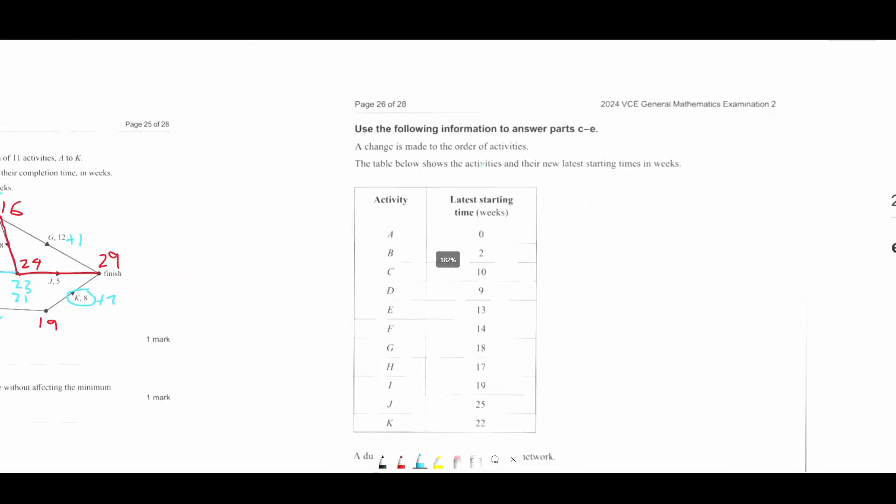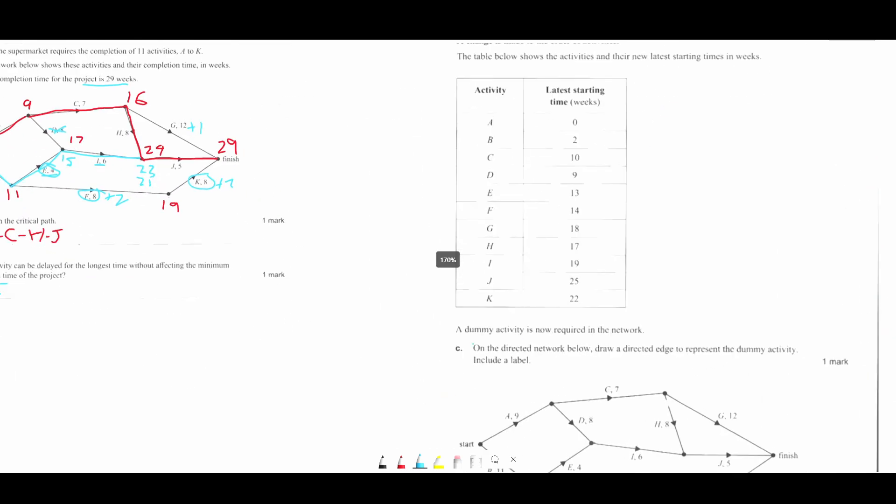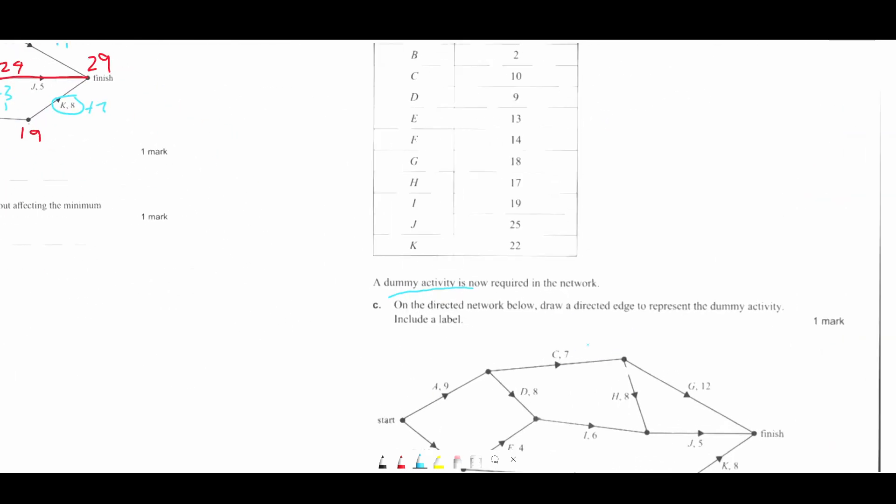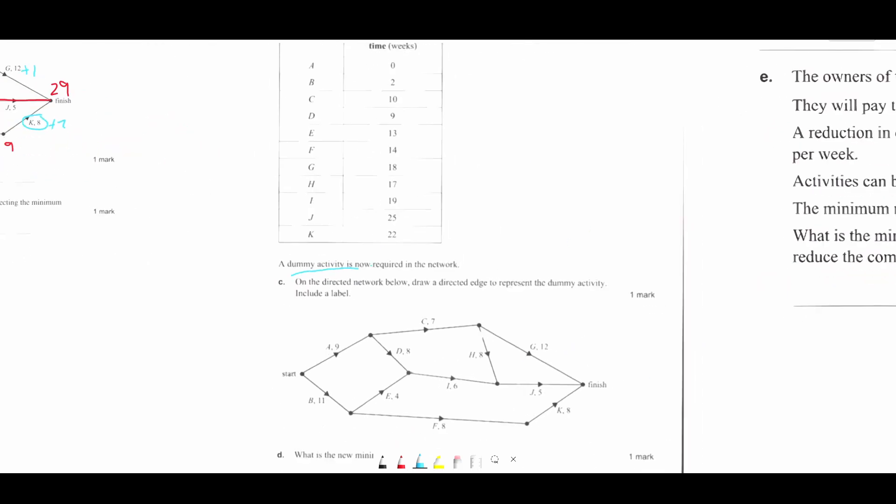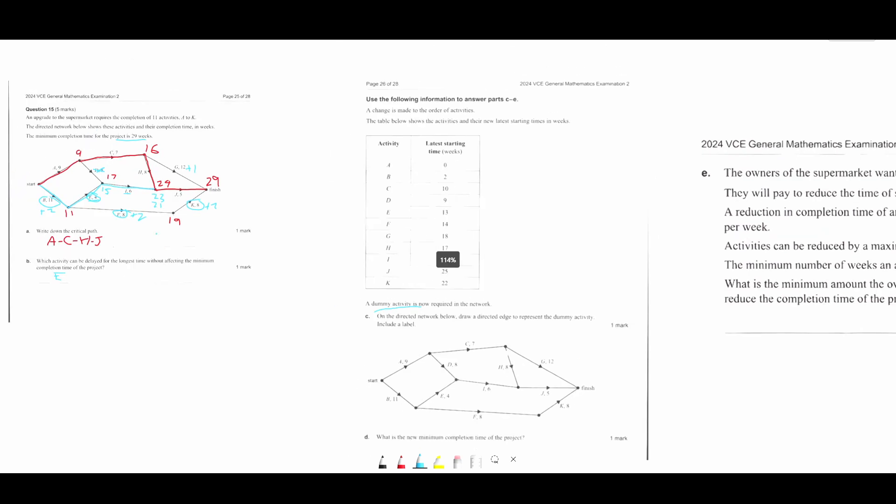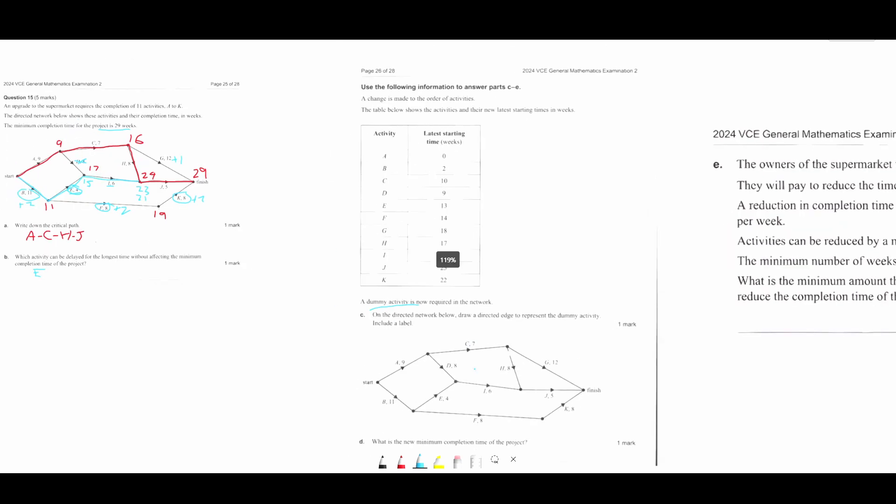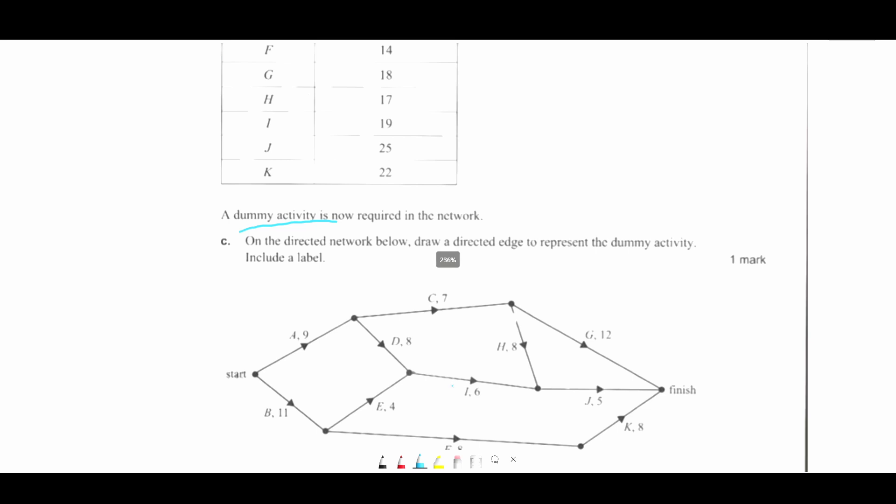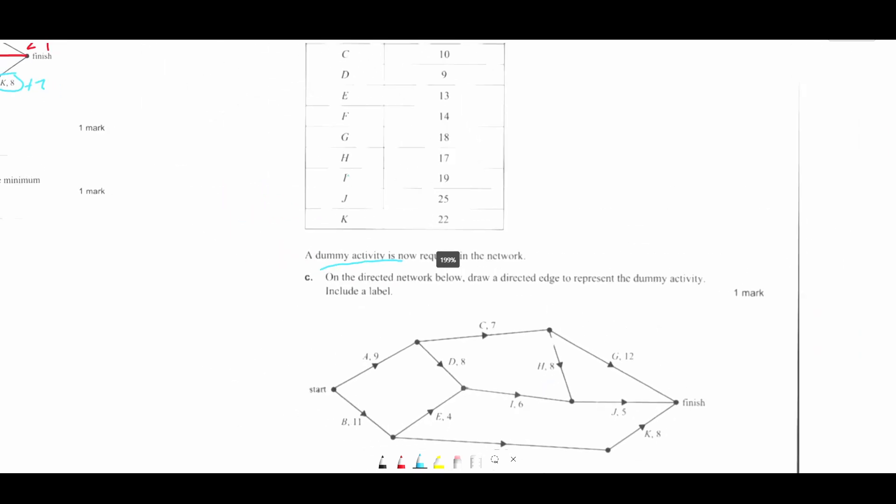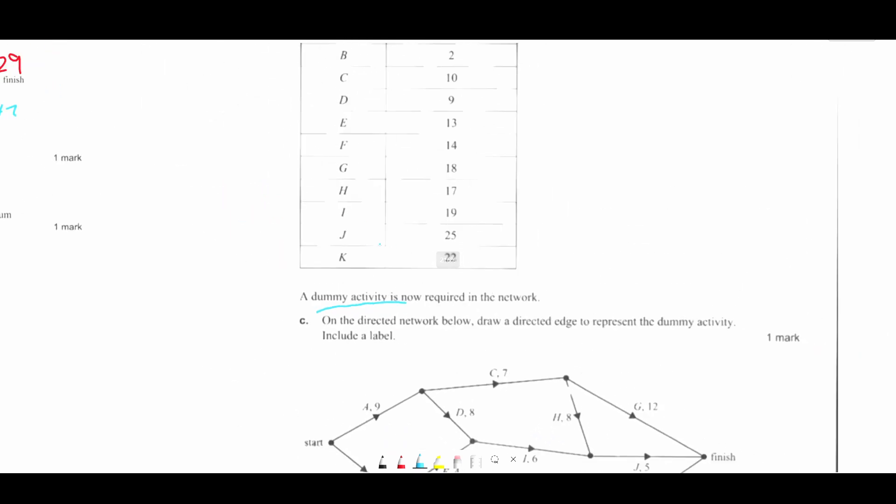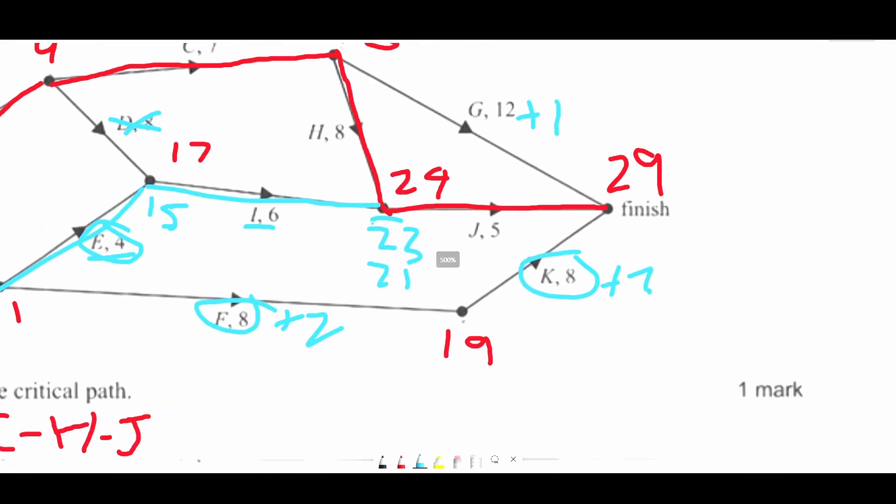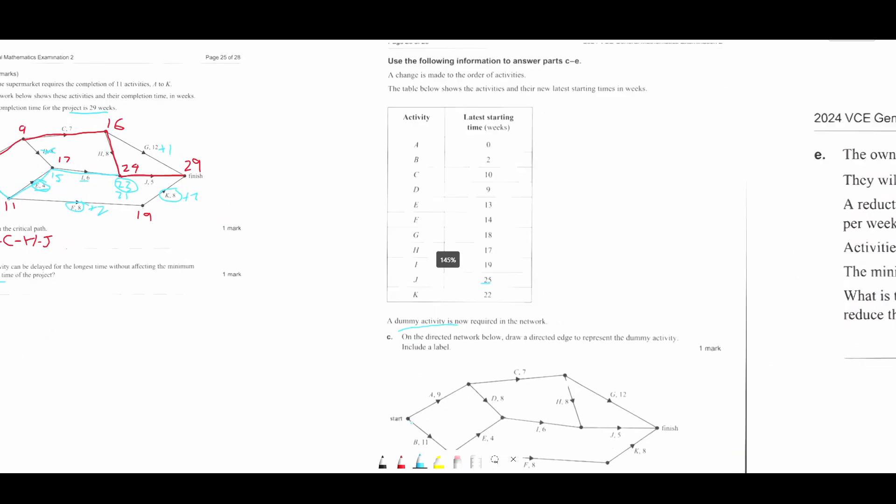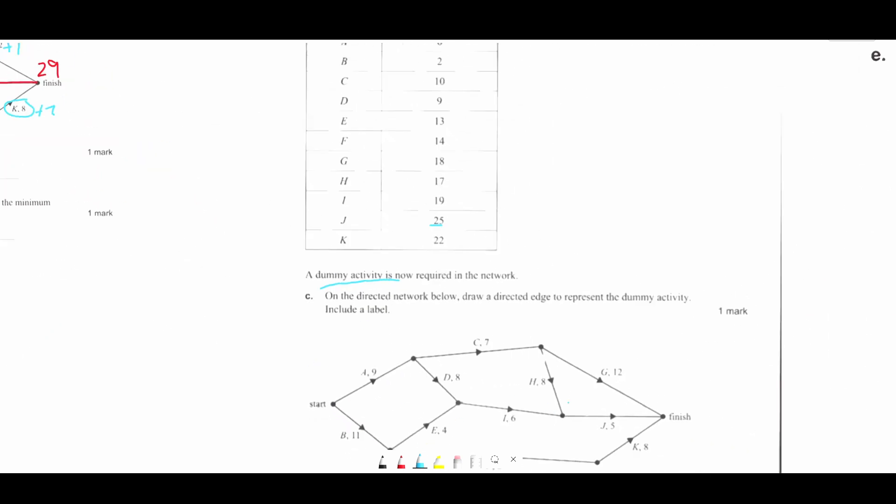A change is made to the order. A table below shows the activities and a new latest starting times. A dummy activity is required. Now we have to draw the dummy activity. So the project completion time probably would have changed then. Looking now, J is 25. I don't remember seeing 25 after J. Yeah, before it was 23. So there must have been a dummy activity being added here somewhere before J.